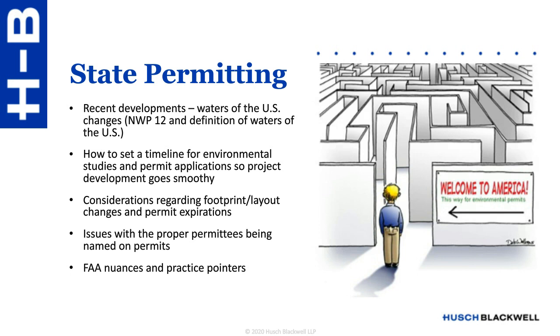And again, I think it's a matter of methodically and comprehensively looking at the downstream impacts before you make that decision to move a turbine, expand or alter the project layout, or change the name of the project: identify upfront all of the affected permits, agree on a schedule for making necessary adjustments, and evaluate the effectiveness of your permits, should the changes be pushed through, or whether prior approval would be needed.